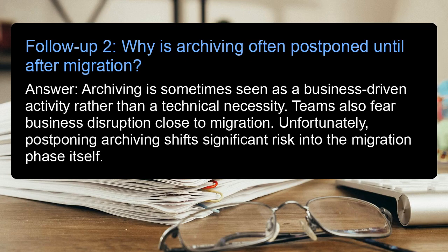Follow-up 2: Why is archiving often postponed until after migration? Answer: archiving is sometimes seen as a business-driven activity rather than a technical necessity. Teams also fear business disruption close to migration. Unfortunately, postponing archiving shifts significant risk into the migration phase itself.